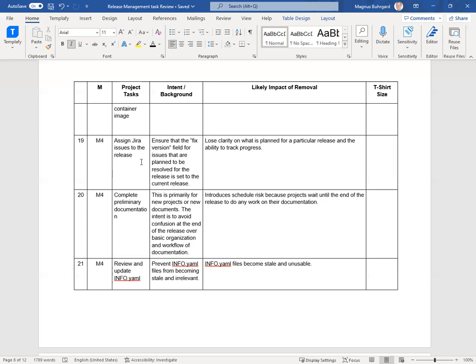Yeah, in that sense, it is kind of a control because you expect to be able to resolve all the Jiras. No, not at all. It's a rolling process. So at the end of the release, we say, okay, whatever you weren't able to do, either close it and say this isn't going to happen, or assign it to a future release, the next release or the one after that. No, I wasn't very clear there. Resolved, I mean that you either do it or you postpone it. Yeah, or just say it's not going to happen at all. Won't do. Okay.